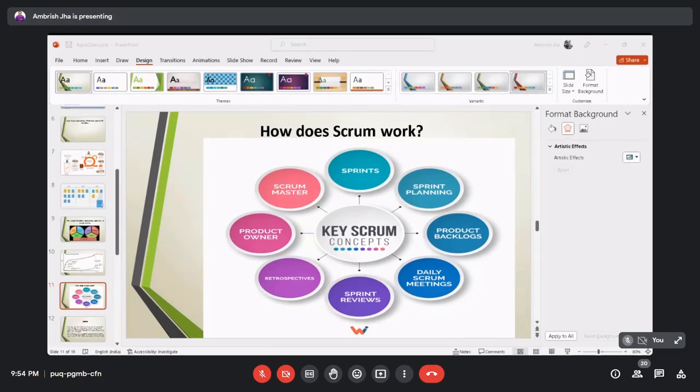Then, when we are planning the sprint, we subtract the time if engineers are on planned leave. So definitely we know how much effort we can put into a particular sprint, and we have the list of tasks along with the level of effort. By matching these, we can also cover what percentage of the time we will cover in the ticket assignments, whether that is 80% or 90% or 50%.